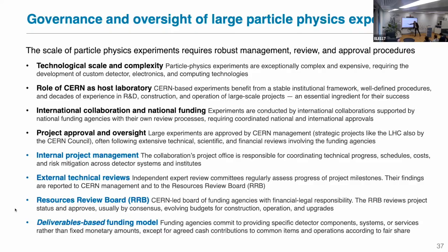External technical reviews: independent expert review committees who are not part of the project regularly assess the progress of the project milestones, and their findings are reported to the experiment, but also to CERN and to the funding agencies, to this resources review board I mentioned before. So that's very important. There's an external review, and if you're not doing a good job, they will tell CERN that you're not doing a good job. So you rather stick to schedule and cost.